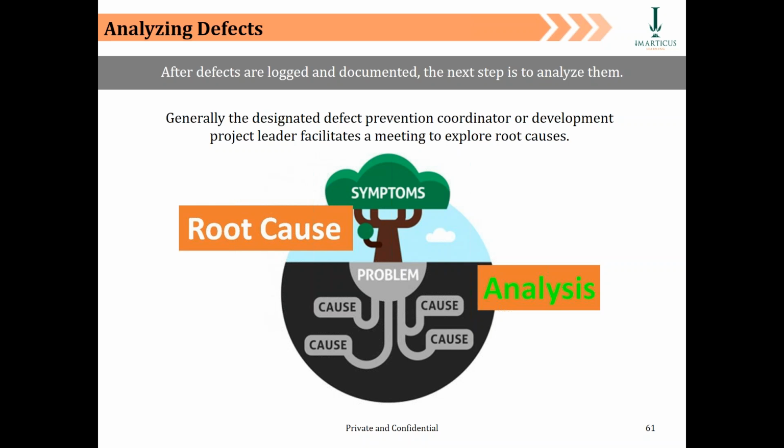So whoever is the main programmer or the tester or the functional configurator of your team, you just need to make sure that they are doing some kind of analysis and study so as to bring back to you, maybe every fortnight, an update about what recurring trends they saw in their respective areas.